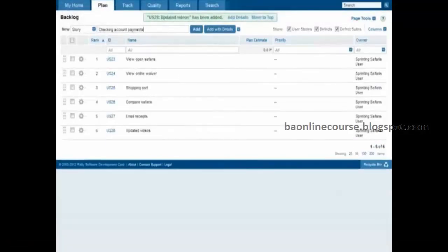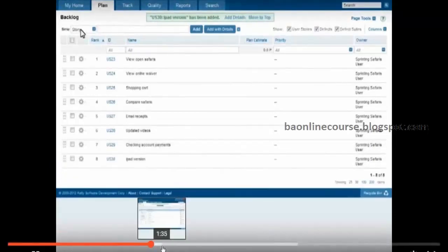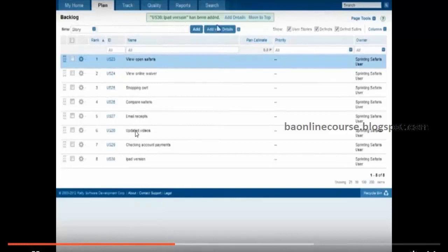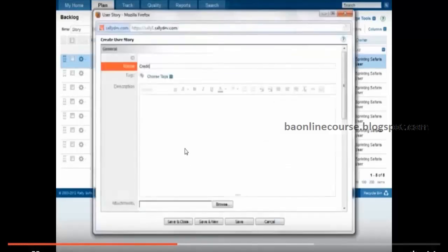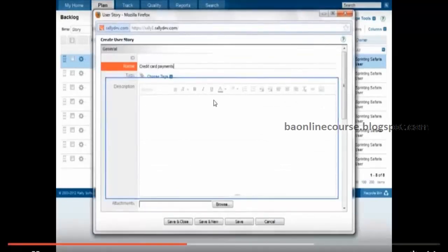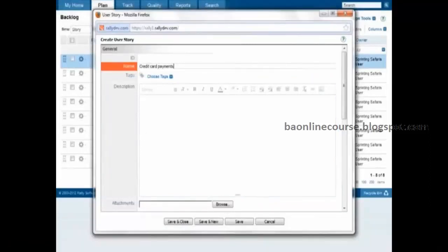So first step, you will create the backlog, and then give them a prioritization. All we are doing is giving them a rank. If you just move it above, then the rank changes. Then you would capture the details for each user story. Again, it would have the same structure: a description, a conversation, and a confirmation.